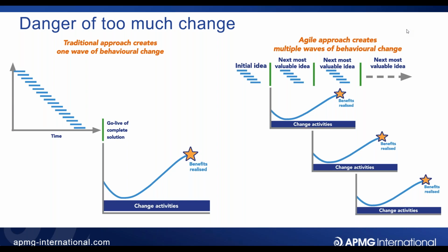So I find that I sort of have to unpick a little bit of the work I've previously done so that it's ready to go to a wider audience. And again, that unpicking and having to redo some of the work doesn't come for free either. So there are diseconomies of scale, and there is the cost of feedback in an Agile approach. So if you haven't got uncertainty, if you don't need feedback, if you don't need to consider how the experience is and whether or not there are other things we should add, then just go straight for the traditional approach.